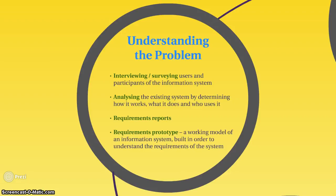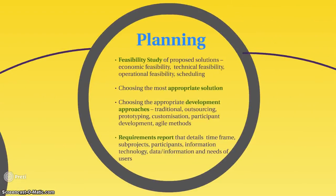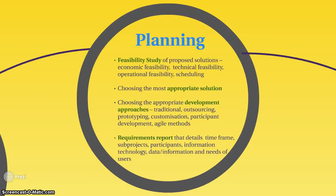Once we fully understand the existing system and what issues exist, we start planning the new solution. This involves a feasibility study, which is comprised of four main parts: economic feasibility — the financials of the new system, do we have enough money; and technical feasibility — the technology, hardware, and software that will be used by the new system.